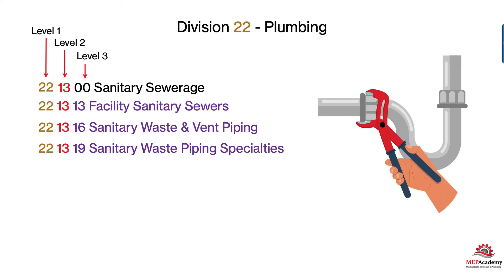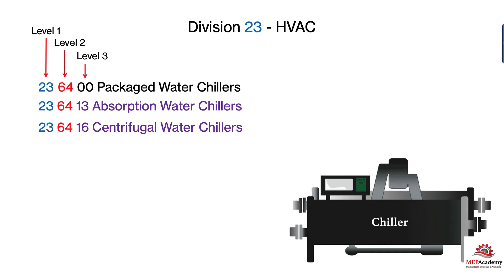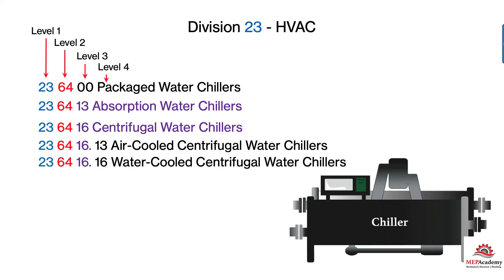Those are the main levels, but you can get another level that breaks things down even further. Engineers will put a period and then another set of numbers. For example, Sanitary Waste Piping Specialties has more than one item under it: sanitary drains, fats, oils and grease disposal systems, and grease removal devices. Same with Chillers — Centrifugal Water Chillers, number 23.64.16, can be broken into Air Cooled and Water Cooled Centrifugal Chillers. It's a way to break down the category further.